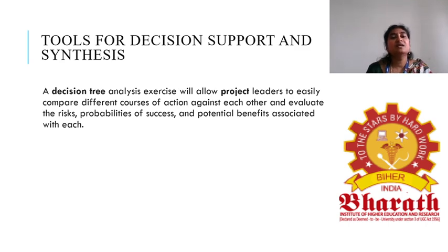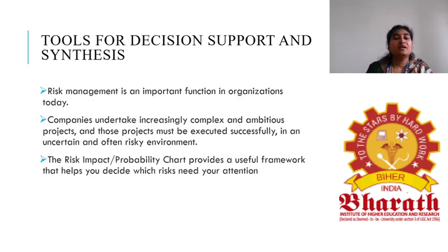And another tool for decision support is decision tree. Decision tree analysis exercise will allow project leaders to easily compare the different courses of action against each other and evaluate what are the risks associated with using every technique, and the probabilities of success and the potential benefits associated with each. And risk management, we have tools for making decisions regarding the risk involved with the software project.